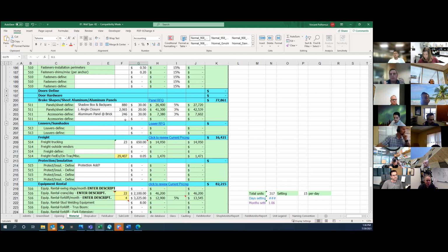So if we had a relatively straightforward project and we're just using overhead closers and bollards that we would work with either our SPD or interiors group on, and using standard pricing that we have from them, it may very well just be all in that storefront estimate, right? But if I had something different or custom that I was going out for quotes on from a vendor like Assa Abloy or Capital Door or someone else, that may be its own separate estimate. So that's the other step.